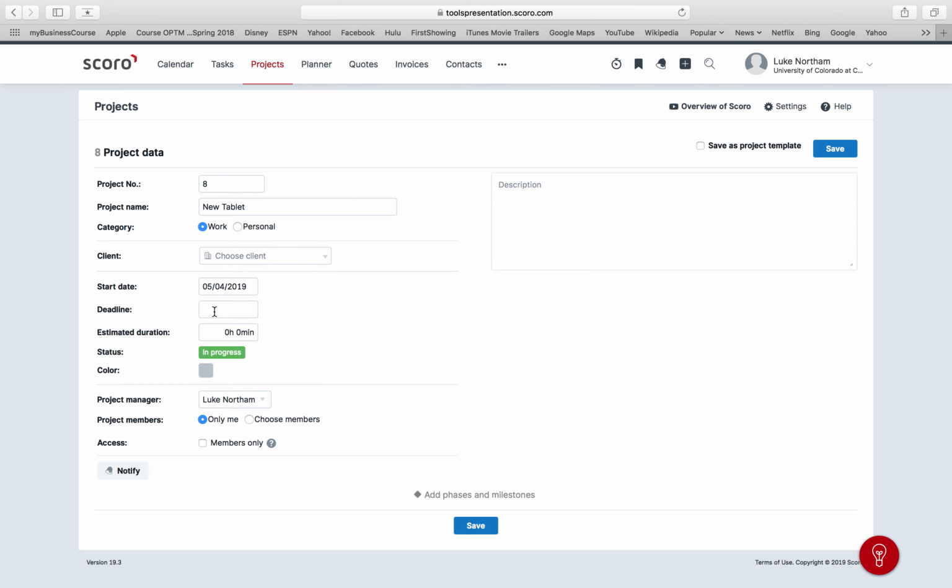You have a start date and a deadline. Another problem with the estimating is that this program doesn't really allow you to estimate how long it will take. It pretty much just tells you to input a deadline for when it's due. That doesn't tell us a whole lot about how long the project will actually take. It just gives us information about when we need to have this done by. So if we're trying to estimate how long it will actually take, it's probably better to use MS Project or something like that. Another problem is the duration. The duration in this entire program is only in hours, so if you want to look at days, you have to convert hours into days or days into hours in order to put it in this program, which is kind of frustrating. But that's just how this program works.